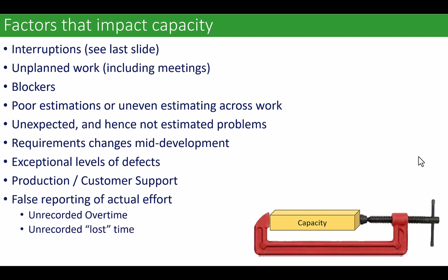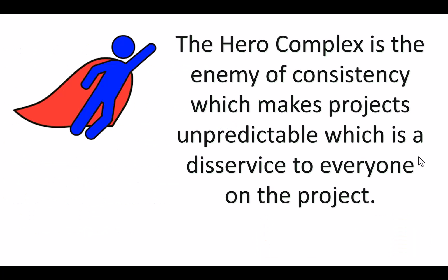If you increase that capacity invisibly by working unreported overtime, then you got more done in less capacity, and so you have over-delivered. And not only is that bad because you set an expectation that you can do something complicated in fewer story points, but you're going to run the people doing it crispy.